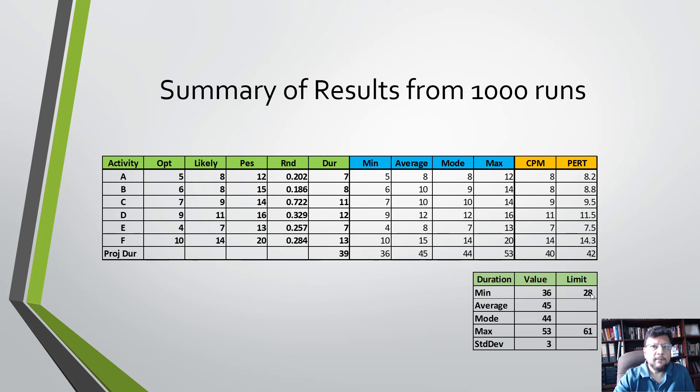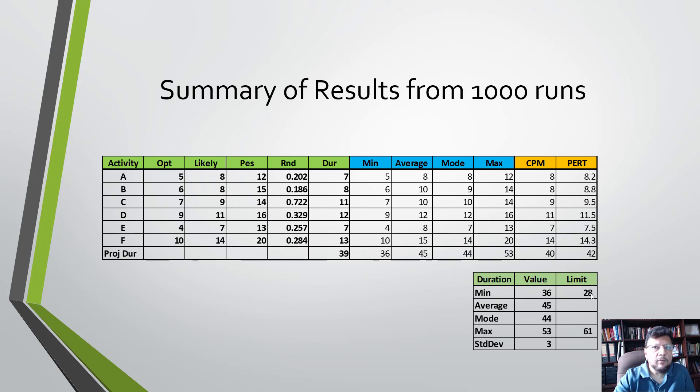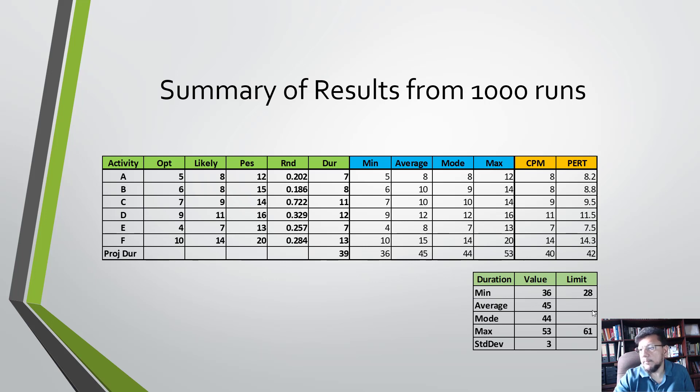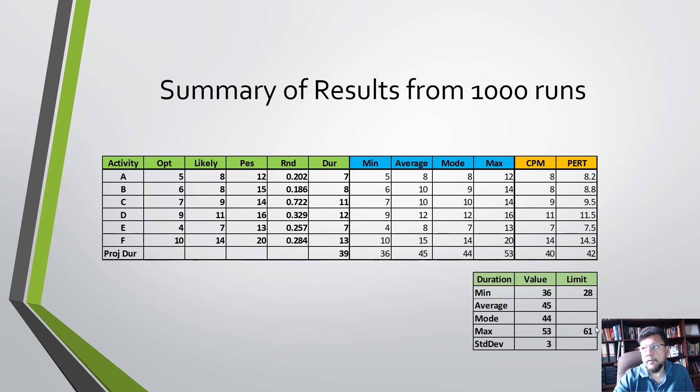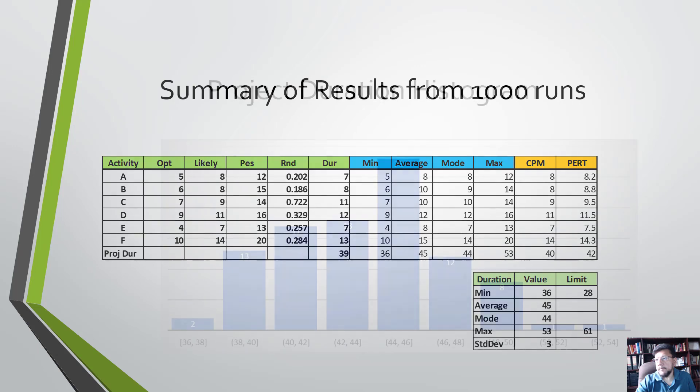Because if you're randomly generating durations for each one of these six activities, the likelihood of you getting the most optimistic for all six of them together is pretty low. The same thing is true for getting all six of them to be pessimistic - it would have given us 61 days, so it's low also.